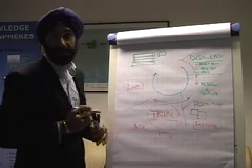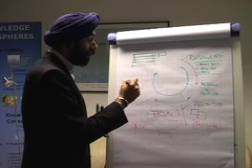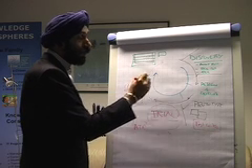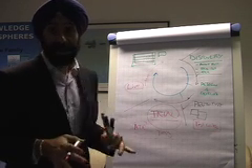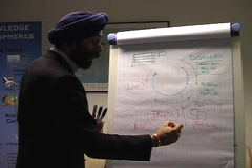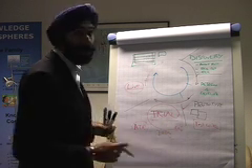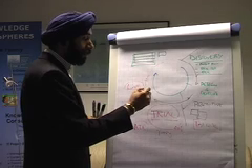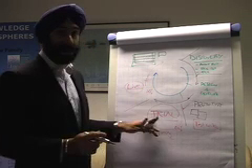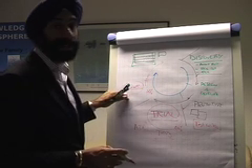We'll go live, and when we go live we can also en route check to see how well it's going. And then a rule of thumb normally is that we have about 20% of the people involved here and about 80% the remainder over here. So we're actually trialing our solution and eventually we're going live with it.